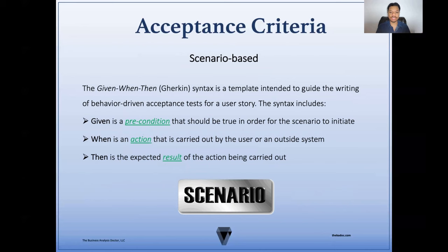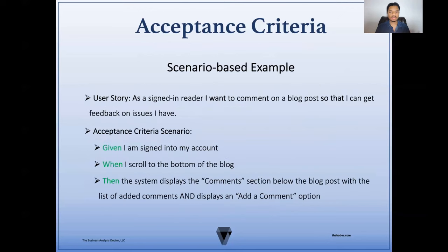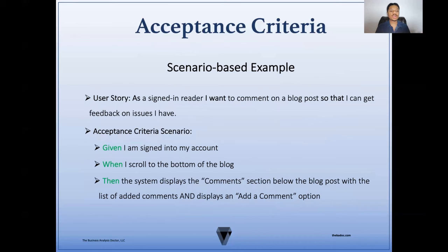Now let's look at the scenario-based acceptance criteria. The given-when-then format, or formally the Gherkin syntax, is a template intended to guide the writing of behavior-driven acceptance tests for the user story. The syntax includes a given, when, and then. The given is a precondition that should be true in order for the scenario to initiate. The when is an action carried out by the user or an outside system. And the then is the expected result of the action being carried out. For example, for the user story 'as a signed-in reader, I want to comment on a blog post so that I can get feedback on issues I have,' the acceptance criteria might be: given I am signed into my account, when I scroll to the bottom of the blog, then the system displays the comment section below the blog post with the list of added comments and displays an 'add a comment' option.